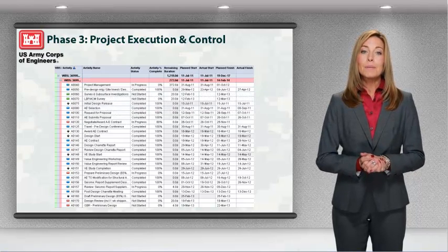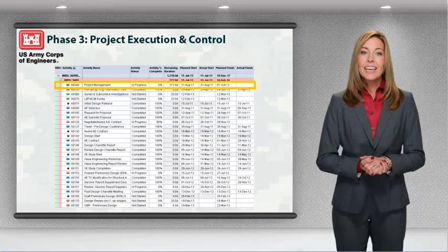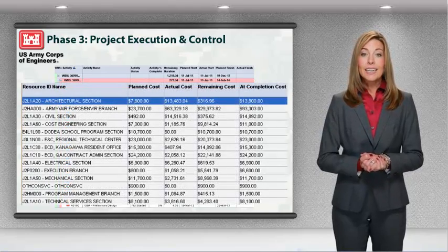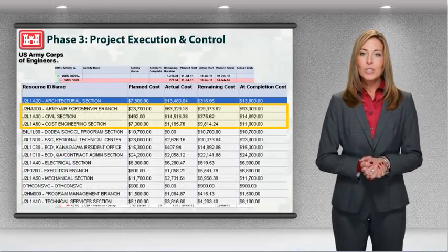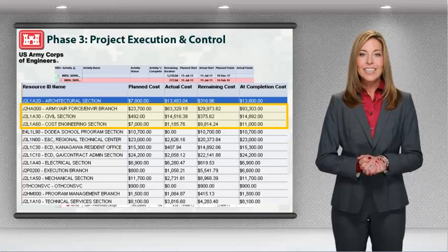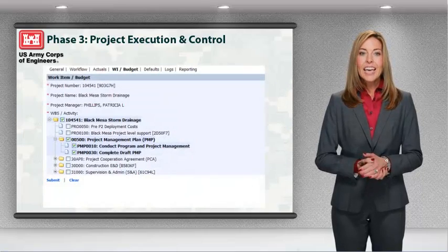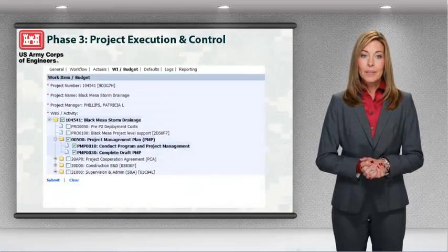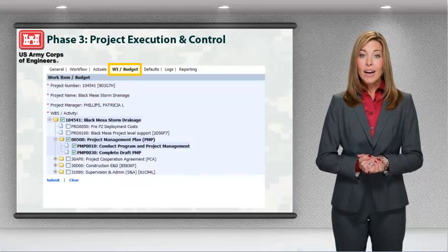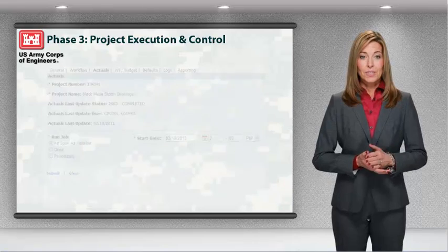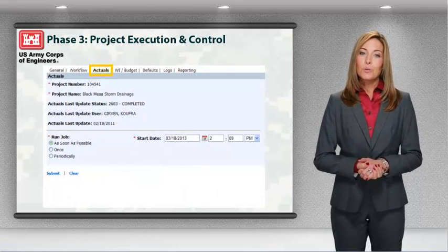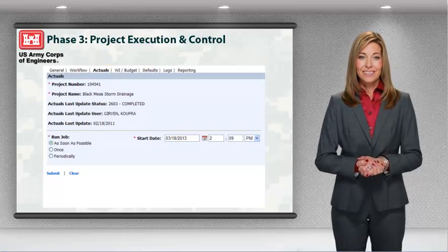If the PM needs to make an adjustment to the budget, they make those updates to the associated activities and the specific resources assigned to those activities in Primavera. In Primavera P6 Web, those with the proper security setting can then select to have Primavera update the budget in CFMS. Statusing the project also includes importing actual expenditures.